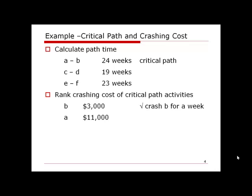After crashing activity B by one week, path AB is reduced from 24 to 23 weeks. Now we have two critical paths: AB and EF, both at 23 weeks. This is another reason we crash one time unit at a time — after each crash the critical path may change. Now, to reduce the project further, we need to crash both path AB and path EF.